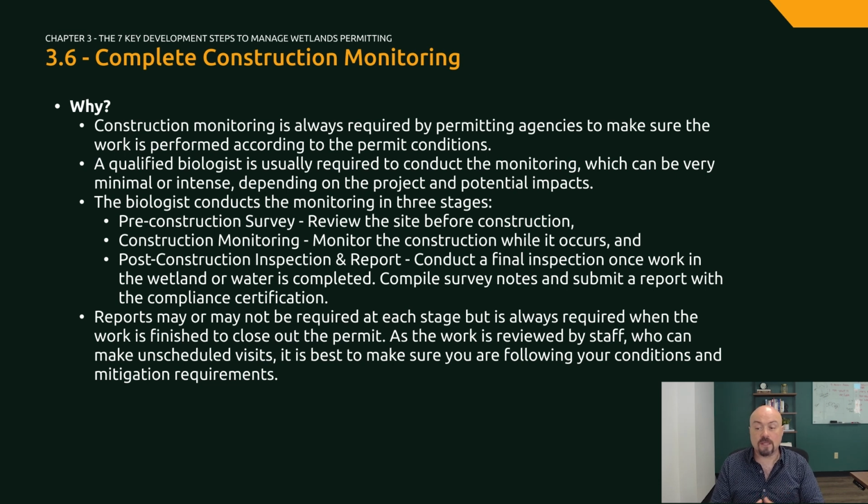Once construction in the wetlands or other sensitive area is over, a post-construction inspection and report may be required and includes compiling survey notes and submitting a report with a compliance certificate to the agencies involved, usually the Army Corps of Engineers. Reports may or may not be required at each stage, but they are always required when the work is finished to close out the permit.